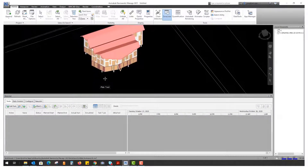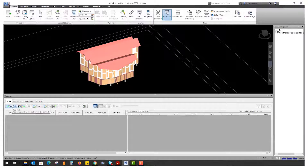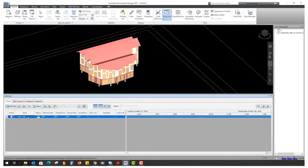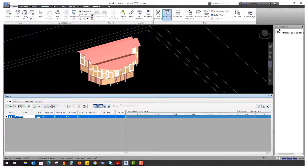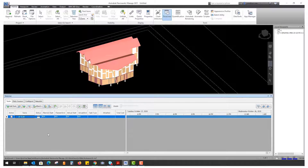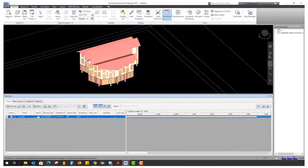Here we have our model and in the Tasks tab I'm going to add a task and name it 'ground floor slab.' This represents the ground floor slab being poured. We're going to keep it simple day by day — just say it starts on the 27th and ends on the 27th.